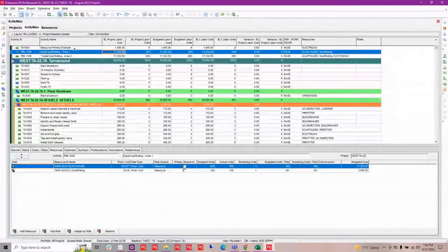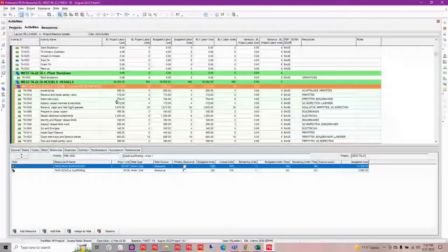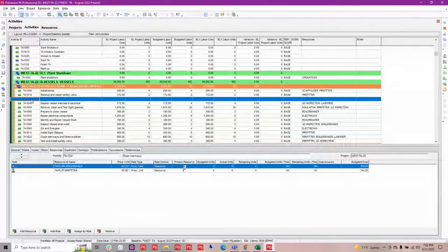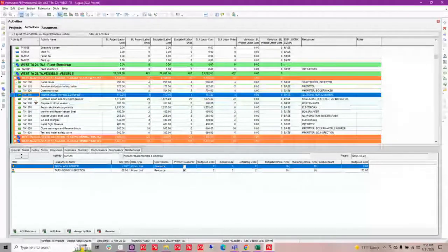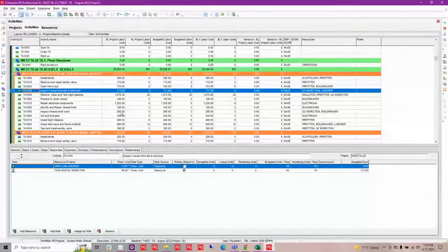And it also has the project itself with that information. I'm going to resort this by activity ID. Now we found some work that I want to add in, and I'm going to put that between 520, and I love it when it does this, between 520 and 540. I'm going to add activity 1530 into here. And then also on a couple of my activities, I need to redistribute my units and my costs.